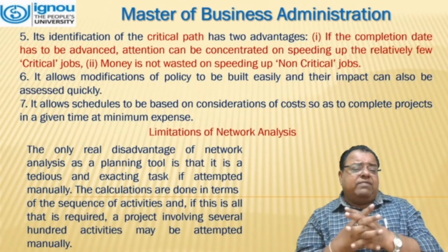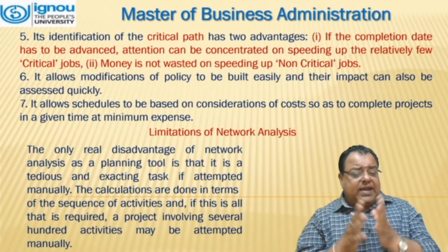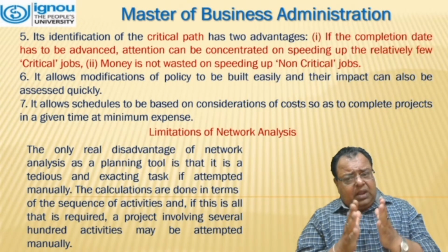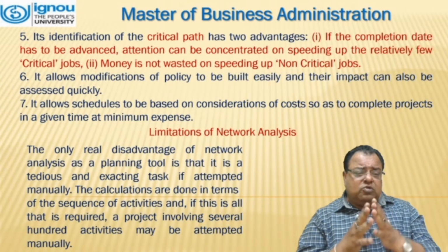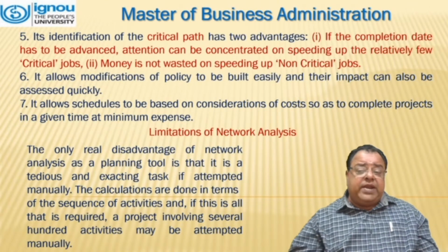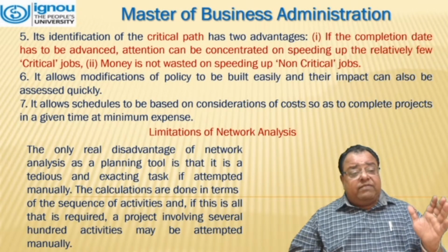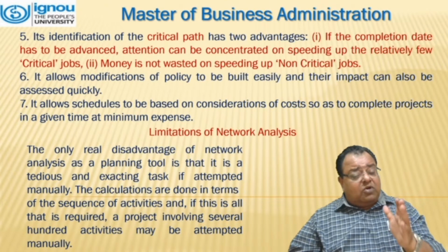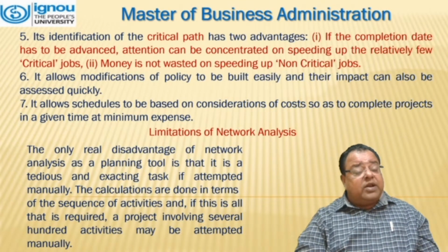Fifth one is the identification of the critical path. It has two advantages. If the completion date has to be advanced, attention can be concentrated on speeding up the relatively few critical jobs. Secondly, money is not wasted on speeding up non-critical jobs.